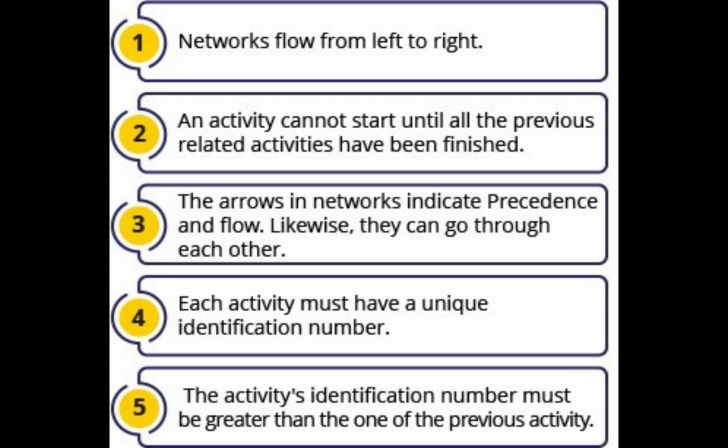Start with drawing the squares of the activities in their logical sequence and connect them through arrows to indicate the required dependency relations, since the project must be executed from start to finish. To show the dependency relations among the activities, pose the following 3 questions regarding each activity. 1. What activities should be immediately finished before this activity can be started? 2. What activities can be done simultaneously with this activity? 3. What activities cannot be started immediately after this activity has been finished?